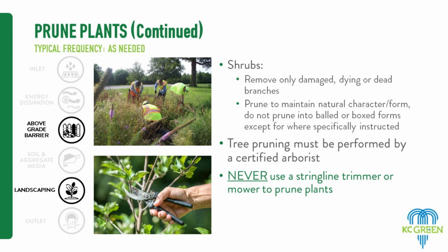I think that's kind of a lesson learned for us. Unfortunately, we've learned more than once that when we tend to have more powered equipment go in here, that's when something happens where we wipe out all the plants because it was misused or overused. So that's something we're going to be really sensitive to, the methods that you guys are using, making sure that we don't do something that we can't undo later on. We don't want to over prune or kill off the plants.